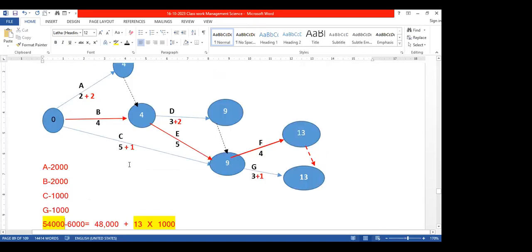Project duration is determined by the critical activities. Right? This is a key point or focal point. You have to note it in your own language, or make a note of that somewhere. What happened while we were crashing?